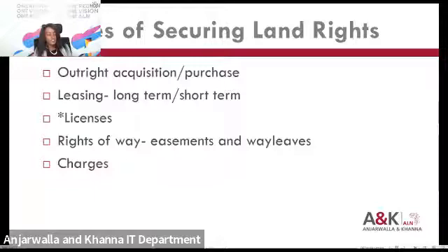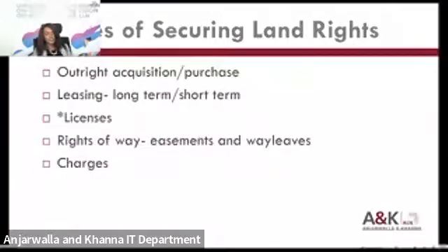There's also charges, which is a less popular way of securing land rights, and the reason for that is because charges do not give the project company exclusive possession or any ownership rights over the property. The only security that charges offer is that they actually restrict the landowner from dealing or disposing or creating third-party rights over the project land without consulting or without the express consent of the project company.